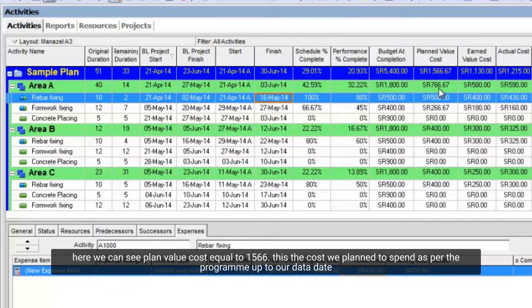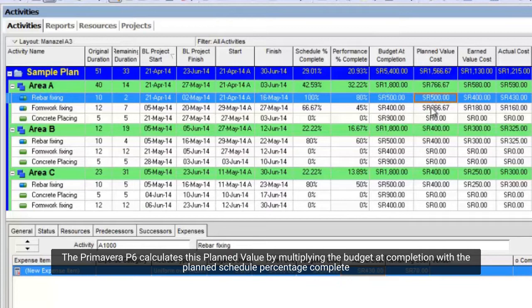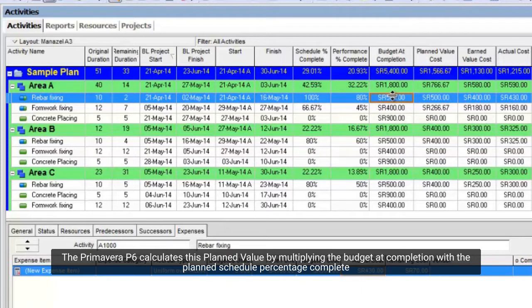Here we can see planned value cost equal to $1,566. This is the cost we planned to spend as per the program up to our data date. The Primavera P6 calculates this planned value by multiplying the budget at completion with the planned schedule percentage complete.